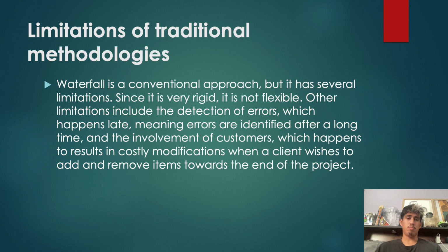So, for traditional methodologies, there are many limitations. Waterfall is a conventional approach, but it has several limitations. Since it's very rigid, it's not very flexible. Other limitations include the detection of errors, which happens late in the process, meaning errors are identified after a long time, and the involvement of customers, which results in costly modifications when a client wishes to add or remove items towards the end of the project. So it really does cause a lot of setbacks.